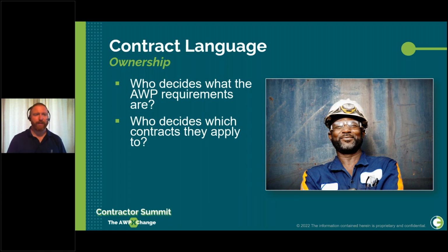How much responsibility is that prime contractor or general contractor happy to take on for directing the work of the sub? And how much do you have to be hands off, just get on with it? So, for example, if you've got a subcontractor who's an integral part of the work and is going to be incredibly critical on whether or not you make the date or the cost or the timing or anything in the successful execution of the project, it's much more likely that you're going to want to include those flow down conditions.